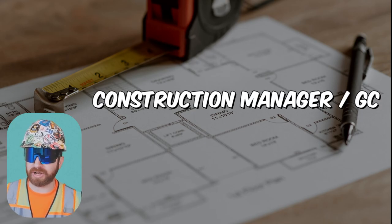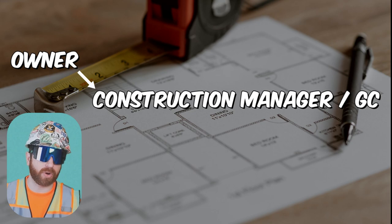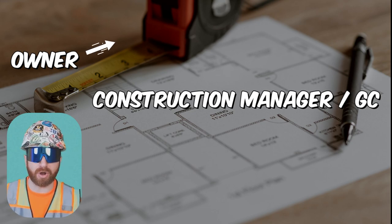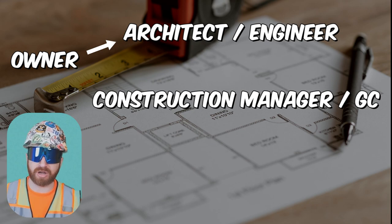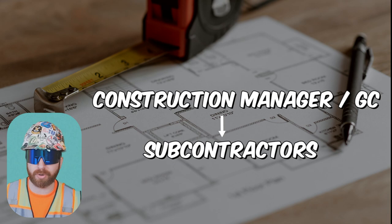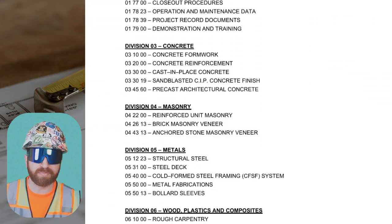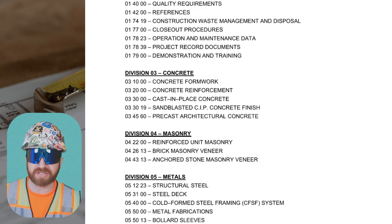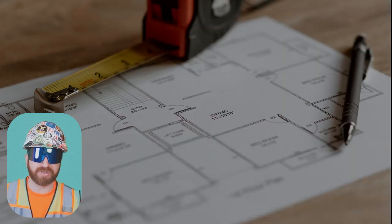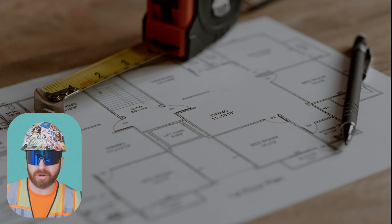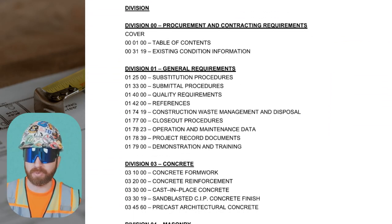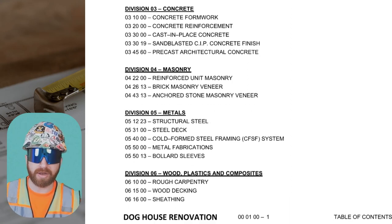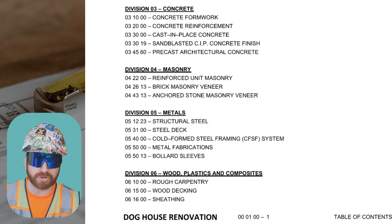The construction manager has been awarded the project by the owner and can now proceed with construction coordination. The owner has a separate contract with the architect and engineer firm. The CM has issued contracts to all the subcontractors for their applicable scope. The CM-to-subcontractor language will outline which specification sections the subcontractor is responsible for — meaning they must fulfill all the requirements of those sections. The required submittals are located within each specification section under their scope of work.